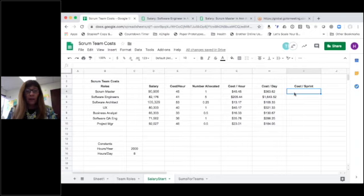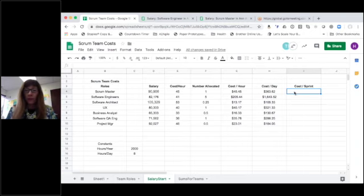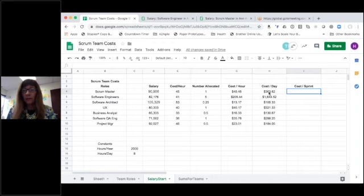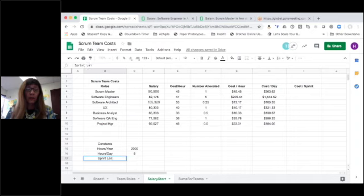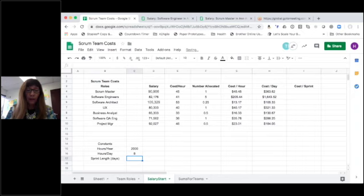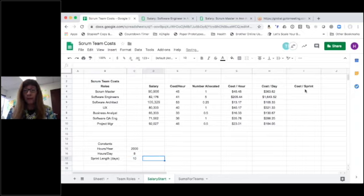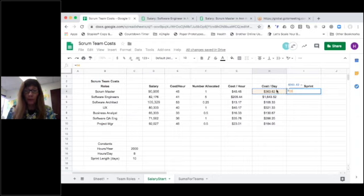Now let's calculate out the cost for the sprint. So it's pretty much the same thing as I'm going to take my cost per day and let's consider it being a two-week sprint. So let's look at my sprint length in days. And let's say a two-week sprint, that would be ten days.